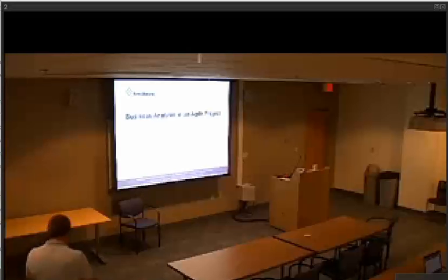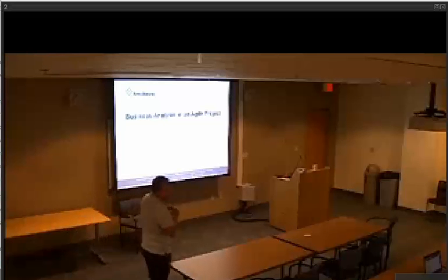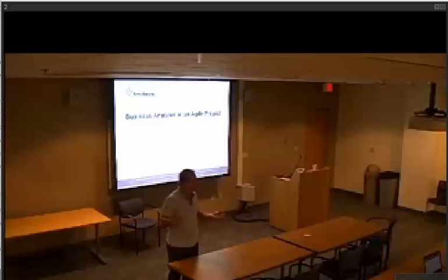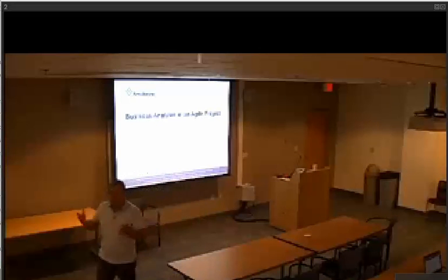What happens if you have very large teams is that you think you're getting more work done, but you really don't. In fact, sort of the cutoff point is about 9 people. There have been a lot of studies done that look at productivity of teams when you go above 9. And every study, same thing. Once you get to about 9, 10, 11 people, take an 11-person team or a 12-person team and compare it against the productivity of a 7-person team. Which is more productive? The 7-person team. So building teams larger than about 9 is very wasteful. Why?